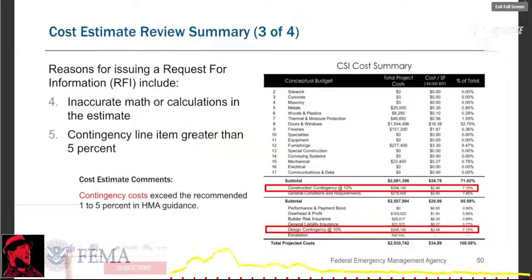So we've been looking at our authorizing legislation and regulations concerning costs, and it may be that inflation costs could be listed as a legitimate separate line item as per 2 CFR 200, but generally speaking, the proverbial devil is in the details. You have to include a good cost estimate, good cost narrative, with a description of the line item cost to support that overall cost estimate.